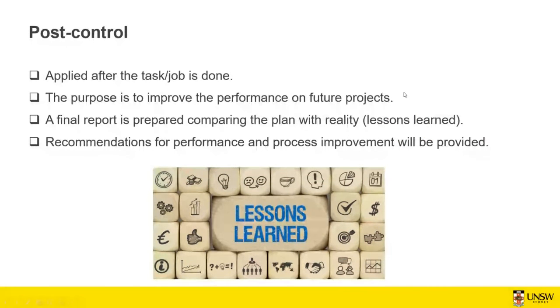So the post control is applied after the task job is done. It can be the whole project, a specific task, or a work package. The purpose is to see how things played out during that particular task, if there are any lessons we can learn from something that went wrong and fix in future tasks, or anything that worked very well and we want to repeat in future tasks. So this is a kind of post control that we can do.